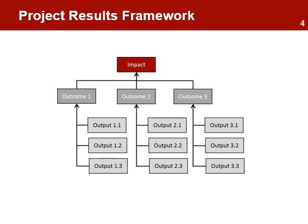The results framework may include one or more outcomes, each necessary to contribute to the long-term impact. Each outcome will include all the necessary outputs required to achieve the outcome objective. This level is important — each outcome must have all the required outputs. The project will not be able to achieve the outcome objective if one of the outputs is not delivered.